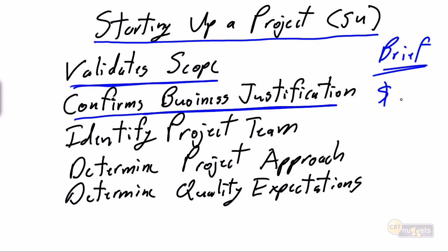There is interest, there is cost of money, there are net present values that all need to come into it. But for the sake of simplicity, to get through this overview, we do the cost benefit justification. $50,000 cost, $10,000 annual benefit, cost payback of 5 years. Yes, that's consistent with our strategy for financial payback in our organization.